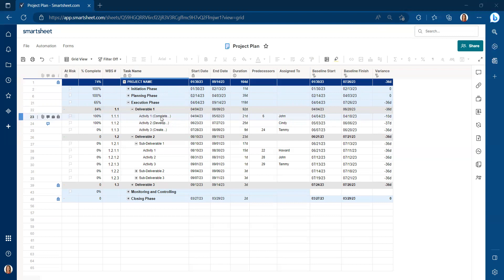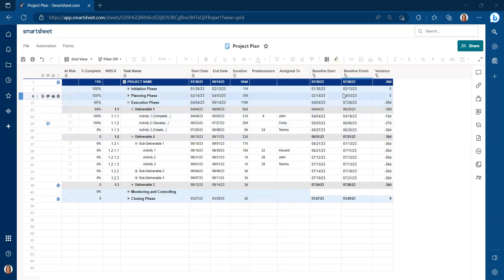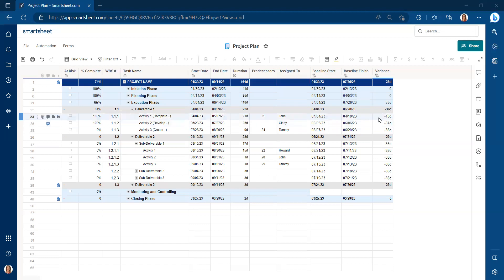This had a project baseline set. And if you look over here, once we add a project baseline in Smartsheet, you're able to see if you're ahead of schedule or behind schedule by looking at the variance.